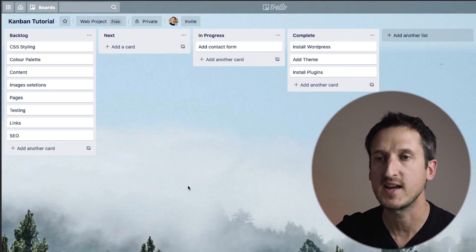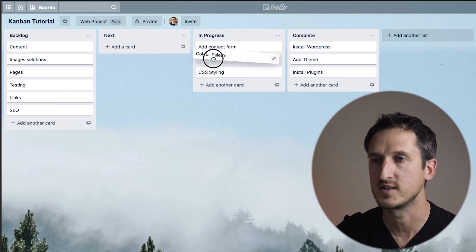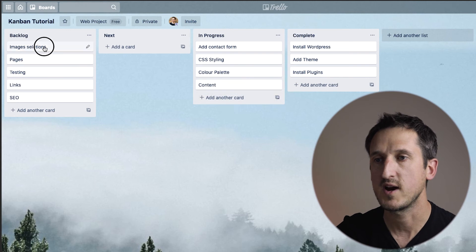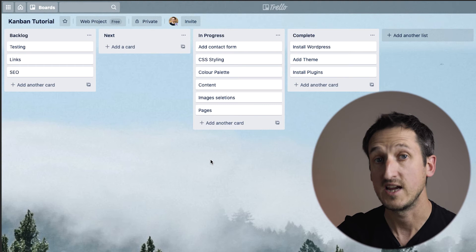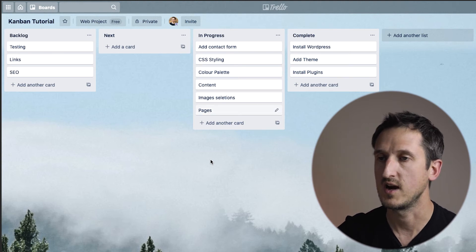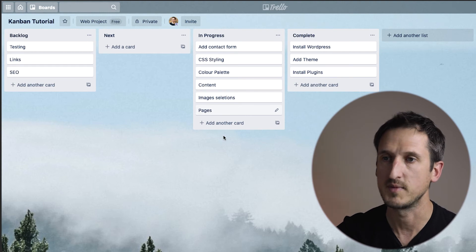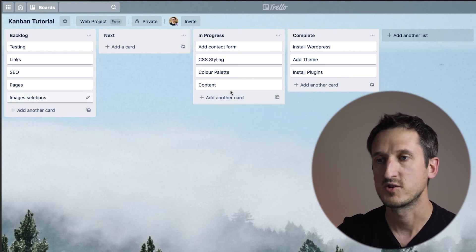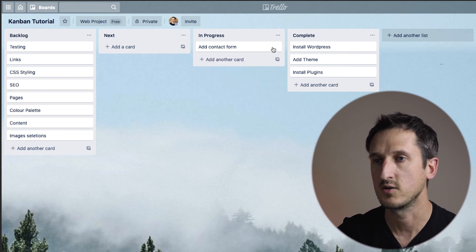Another little power tip for using a Kanban board: do not have everything in In Progress. The point of this board is to keep yourself organized, and if you have everything in In Progress you're not really using it as you should — you've got too many things on the go and that means you're going to be disorganized. The point is to keep things well organized so you know exactly what you're doing next and what job is coming up.